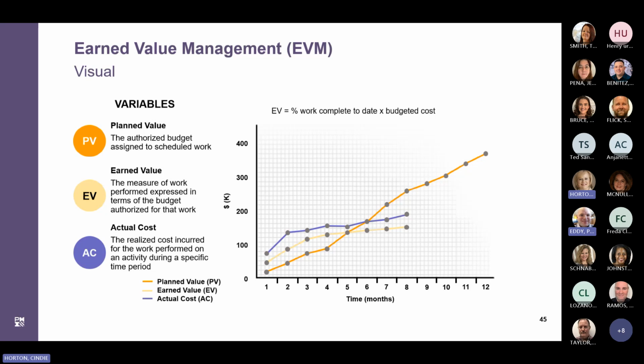To determine the EV of the project work to date, you'll have to look back at the cost baseline to determine how costs were assigned originally. If the planned value was determined by the percentage completed to date method, you will apply the same method of assessing the earned value. So in other words, earned value indicates the value of work performed simply during a particular period.